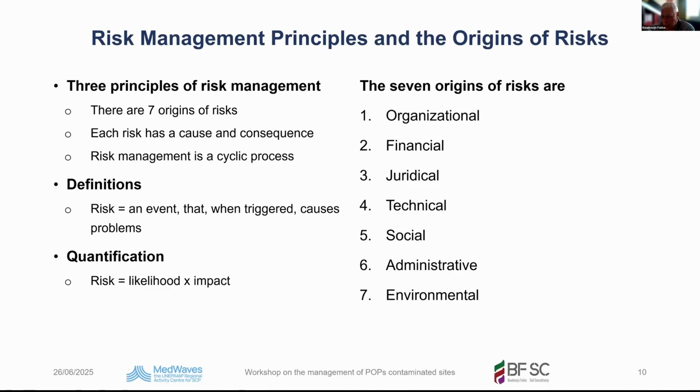We have taken away the direct risk, the potential risk, but there was still some risk related to the contaminated groundwater, so that has to be maintained for a long time. Maintenance, aftercare and monitoring are especially important if you have, for instance, a containment by immobilization, because the situation may change and then you have to be alert. If there are no questions anymore, I will continue.